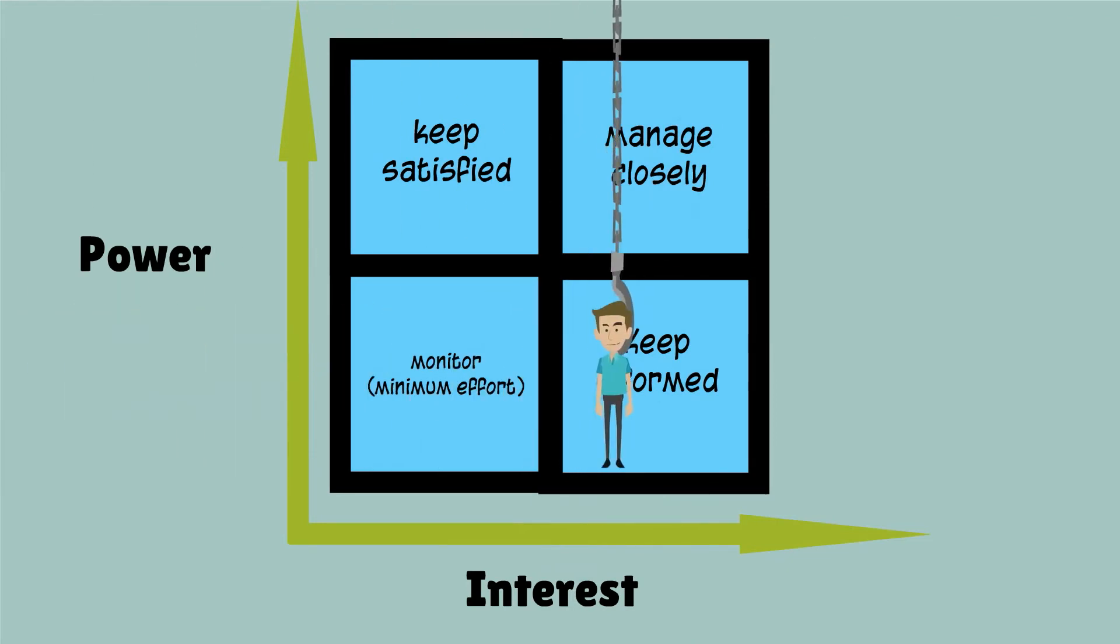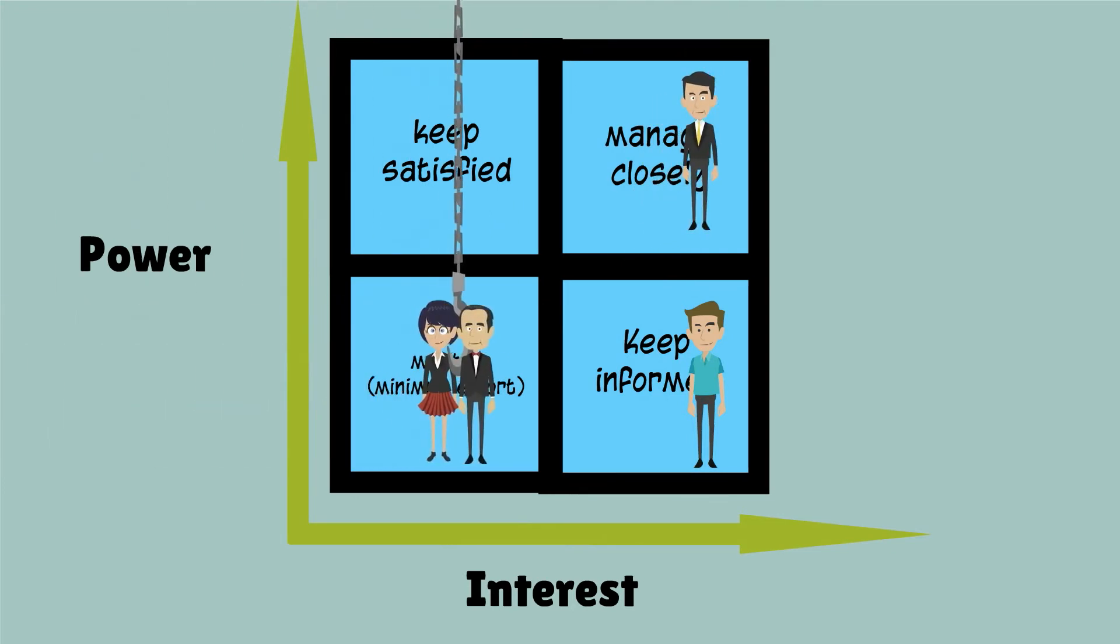In your project, Tim has a high interest but low power, so he needs to be kept informed. Daniel has a high interest and a high level of power, so he needs to be managed closely. And Anne and Bob both have low interest and low power. They just need to be monitored.